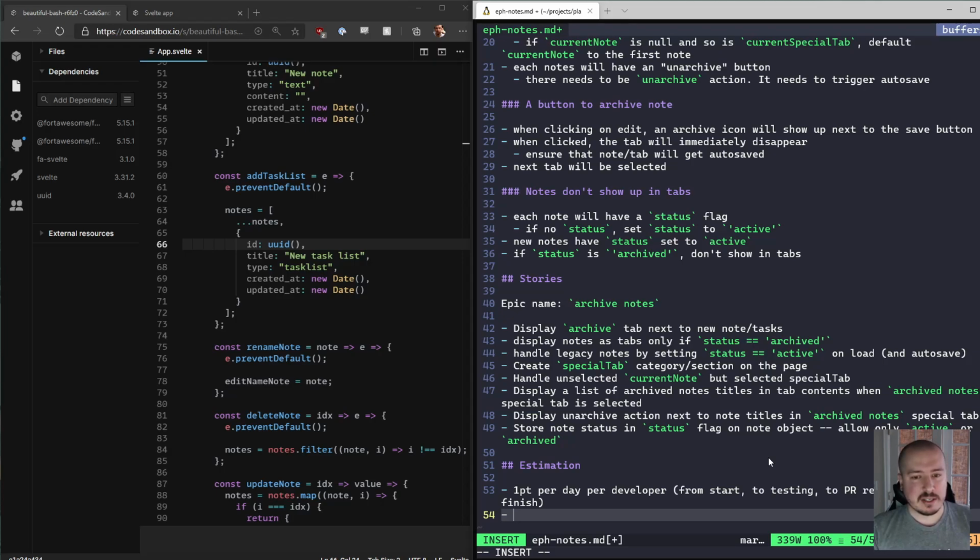If you get 5 of these done in a day, you might get some response. The next day, you might be changing stuff on your pull request, getting it reapproved. You're still having to do testing, maybe end-to-end or integration testing. Then it goes into QA. QA might find something and throw it back to you. If they don't find anything, you still have to wait for the deployment, and all of a sudden the whole week is already gone. And even though you've started on stuff for the next week, it's still 5 points that you're getting done that week.